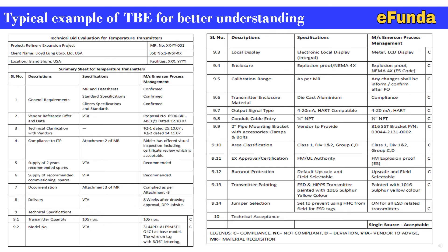Now we'll briefly cover the general requirement confirmed by the vendor based on the specifications. One can completely review this TBE by understanding and studying the table, which covers technical specifications for the transmitter: transmitter quantity, model number, local display, enclosure, calibration range, transmitter type, enclosure material, output signal type, cable conduit entry, 2-inch pipe mounting bracket with required accessories, area classification, ATEX approval or certification, burnout protection for the transmitter, transmitter painting, jumper selection, and the final technical acceptance of the vendor.